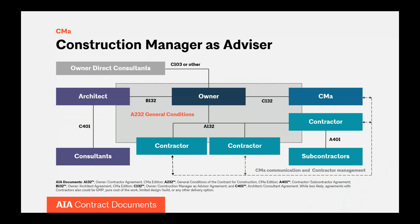Now let's look at construction manager advisor — the topic of our webinar today. CMA is appropriate when an owner uses multiple direct-to-owner contracts to build the project. This may be an owner's choice or a statutory requirement as found in a number of states. The project now incorporates a fourth primary player on the project team — the construction manager advisor. The A232 general conditions coordinate the roles and responsibilities of all parties during construction, written to take into account the CMA's role and multiple contractors.